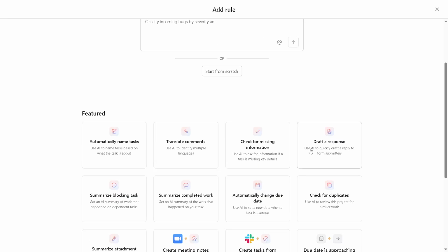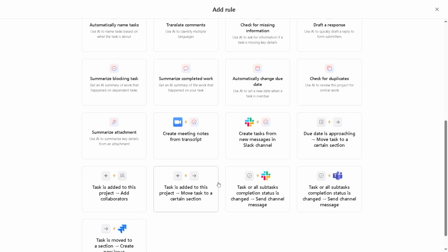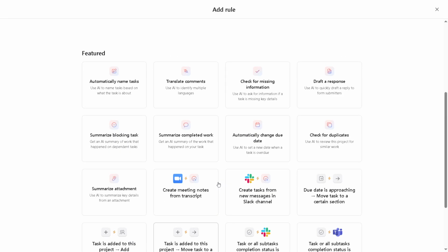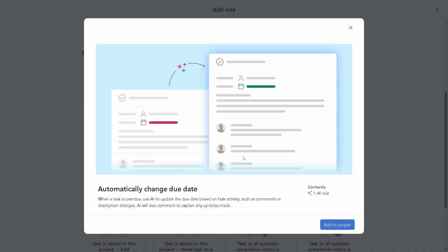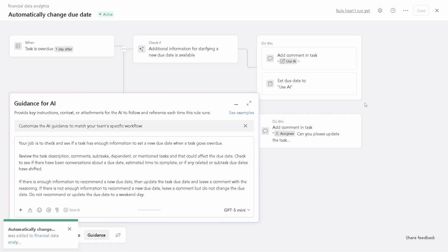Now, Asana gives you the flexibility to create a custom rule from scratch, so select the option to create a custom rule. This will allow you to define your parameters exactly how you want them. Once you're in the custom rule setup, you'll see a gear icon. By clicking this gear icon, you'll find the option to toggle off Run on Subtasks. Disabling this option is essential because it unlocks all due date triggers for you.